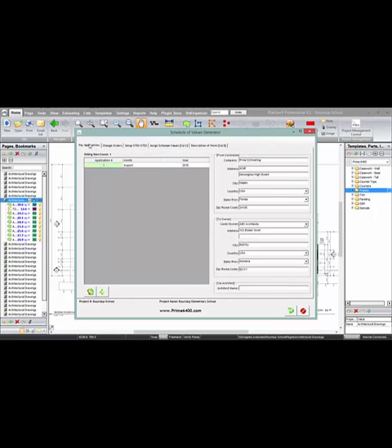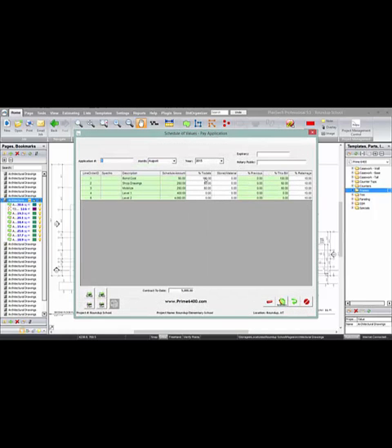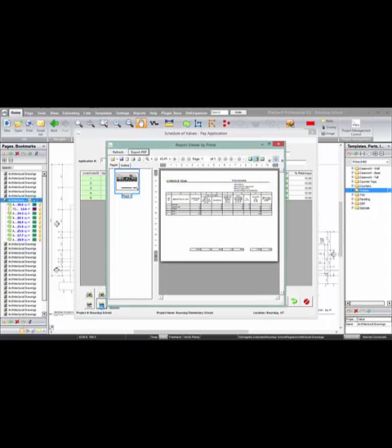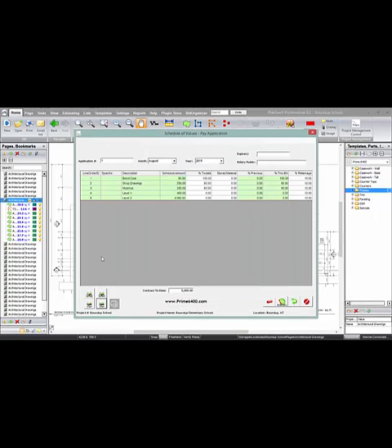Once it's been locked, we can actually go to Pay Applications, and again, looking at an existing one, merely fill in the percentages to date that have occurred on this project. There is an area also for stored materials. Once that's done, we do have an area here for generating the report. This is a draft format that we can use. Again, print or PDF as necessary. If you require that form on the actual copyrighted form from the AIA, there it is for you. You would insert the form, click that button, and it will print for you.